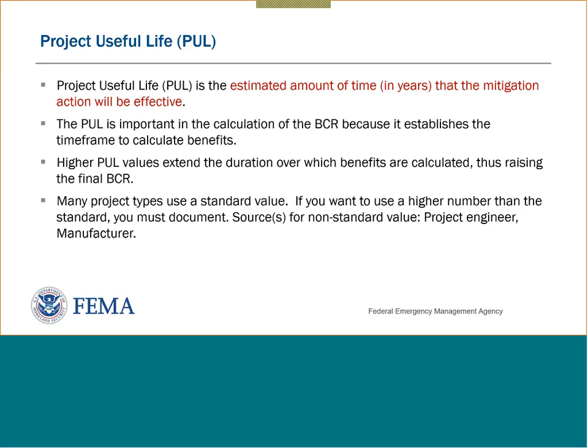Thank you very much. So if you've got that material, the manufacturer of the equipment, you can ask them for some spec sheets. And if they're able to provide documentation, you have something that you can submit with your application. However, even with documentation, a PUL value can't be higher than the highest acceptable limits value that's in that PUL summary table. And again, it's within the toolkit, and it's a really good reference place. Next slide, please.